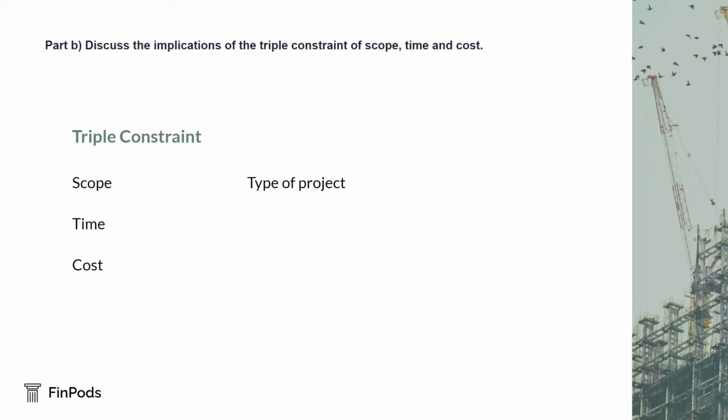In the case of a project with limited budget, cost is a priority. Once resources run out, the project ceases, complete or not. In a safety-critical project, such as building or aircraft construction, ensuring the quality of all project deliverables is a priority.